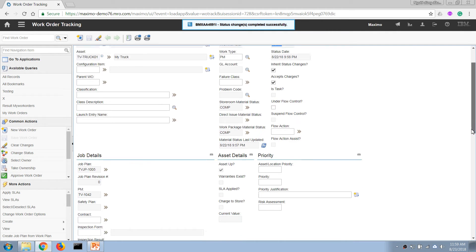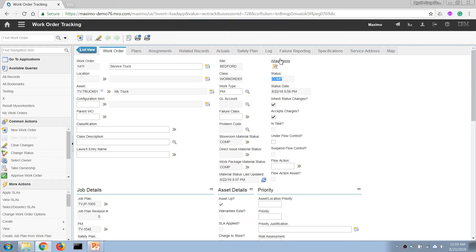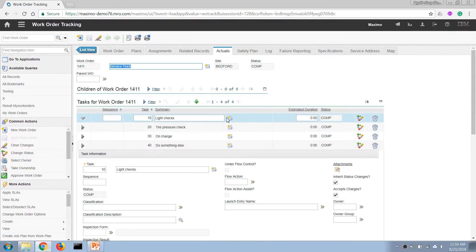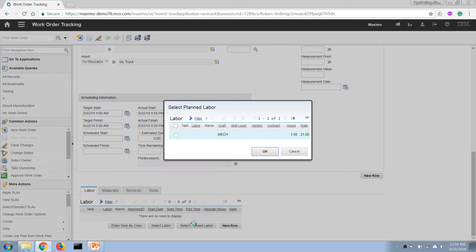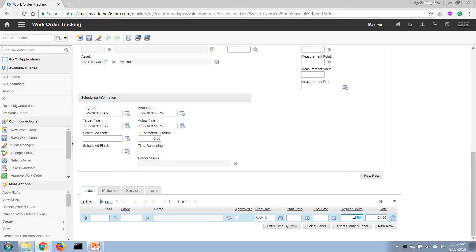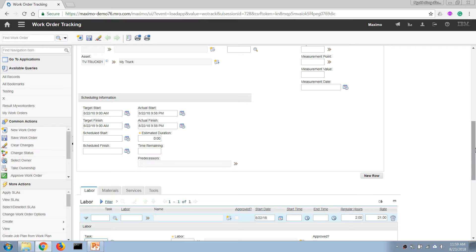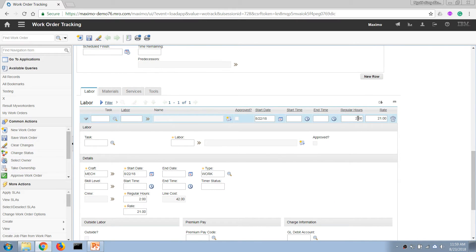After completing the work order, the mechanic or supervisor will come back and open Maximo to enter the actual information. For example, they will enter the actual labor time consumed. In this case, the job took a bit longer than planned — two hours instead of the planned one and a half hours — so we enter two hours here.